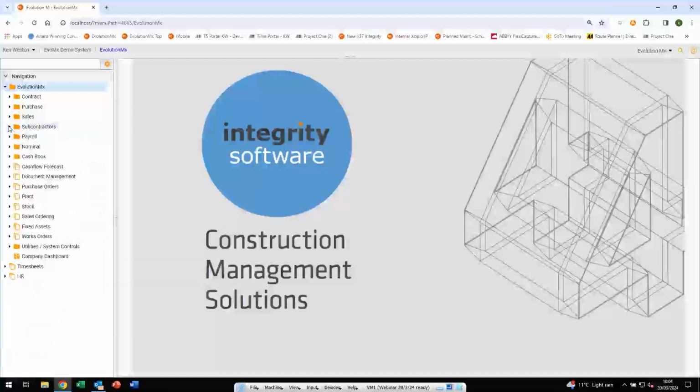The subcontractors' ledger itself can also do things like track public liability insurance details and give you timely reminders as to when you may need to take action with your subcontractors. And subcontractor engagement can be on any basis. It could be straightforward invoicing, in which case there's an invoice register option as well, or it could follow an application process where perhaps there's a valuation by your internal QSs to arrive at a payment certificate that's going to be raised and sent off to the subcontractor.